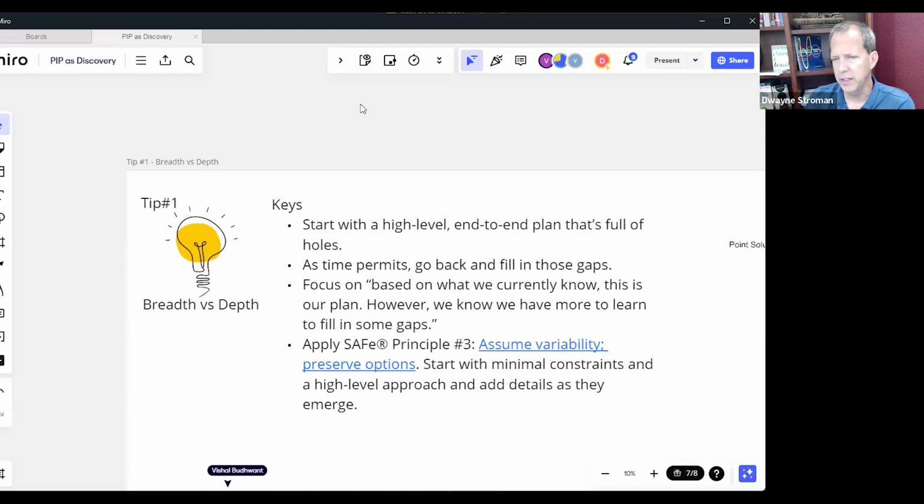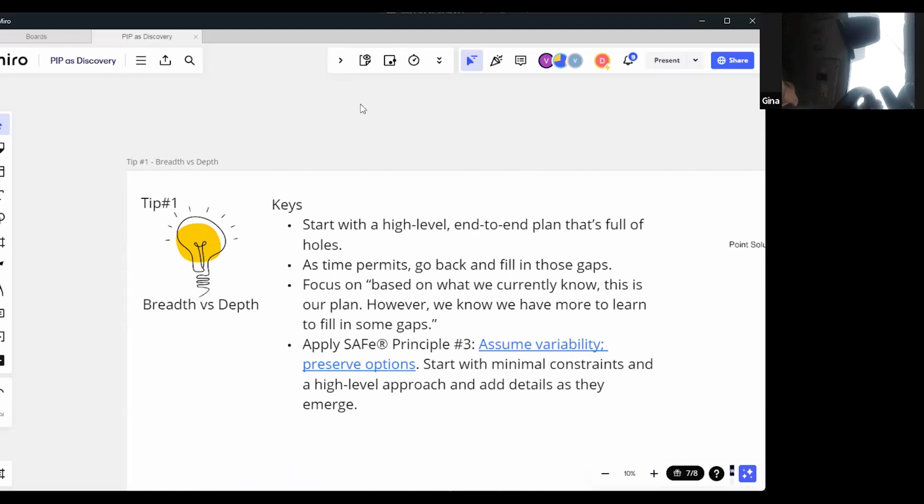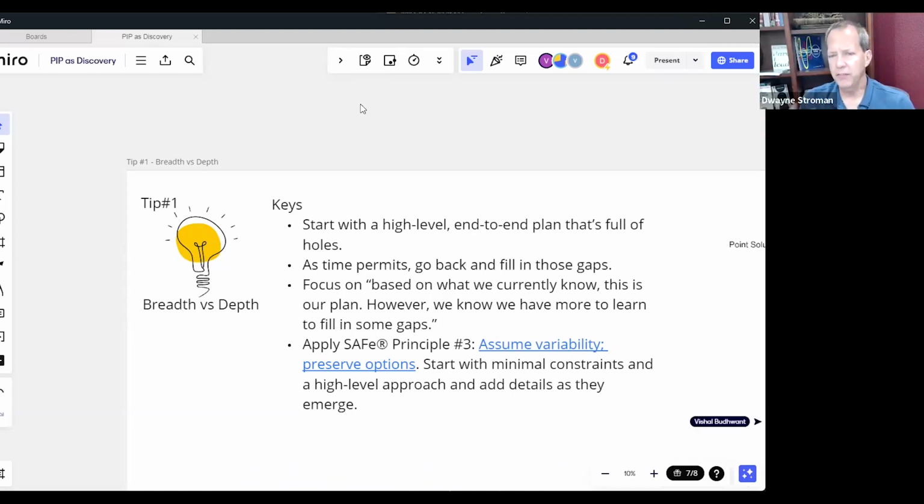We'll see some of this later. But I want you to start getting that really high level plan of how we're getting from beginning to end. And then we can go back later and fill it in. The guarantee then is that by the end of the first breakout, we have a draft plan. We always have a plan to review. How filled out it is, how many assumptions it has, that's based on the context. But we always have a plan to review.